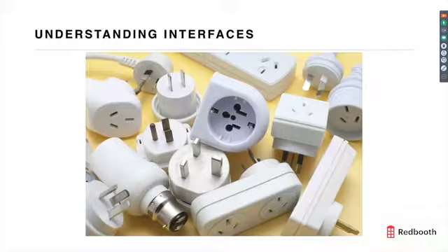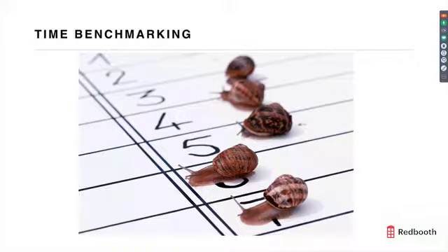And we all tend to underestimate task duration for projects. So as you near the end of a project, teams are often very busy and frequently the closeout is skipped. So having the initial schedule at the end really helps to learn how to better plan in the future. So by tracking timeframes within that Gantt chart, you'll be able to improve your estimations and better plan in the future.